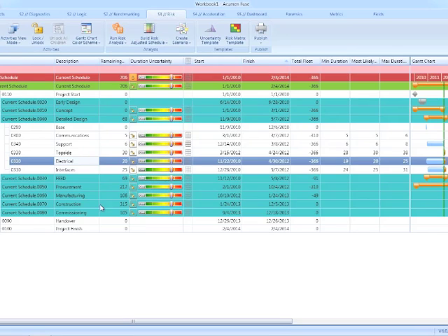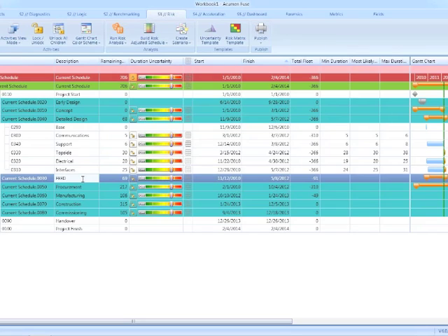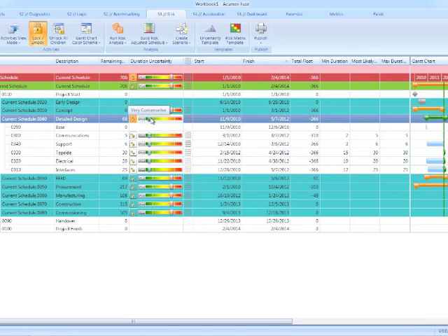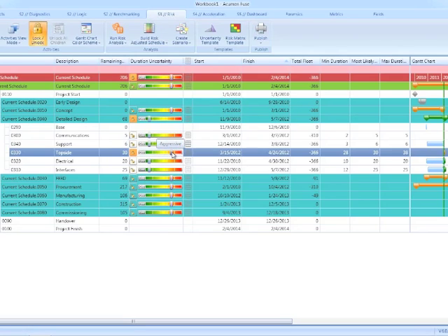Now, going back to the top-down approach, the team during the risk review may say, well, actually, hold on a minute. Yes, the schedule as a whole is aggressive, but detailed design doesn't fit the mold. In fact, detailed design is a very conservative estimate. So we can make detailed design very conservative, and then to take that a step further, the team may ascertain that perhaps the topsides detailed design doesn't fit that rule, and in fact is very aggressive. The reason why this is so effective is that in a matter of 3 rankings, we've actually assigned uncertainty to the entire schedule.